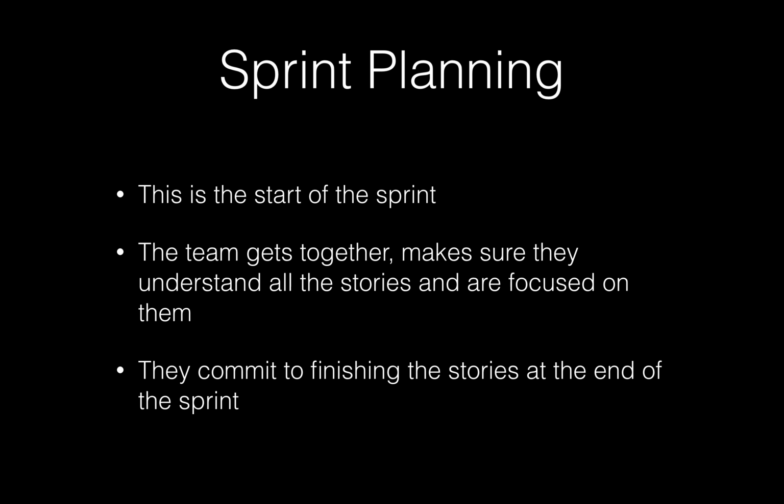Sprint planning is, as I said earlier, the first ceremony of the sprint. What the team does here is gather together and pick the stories they're going to focus on in the sprint. They commit to finishing those stories at the end of the sprint, so they make sure it's not too much work and not too little work. It's just enough work to get done in the sprint. And the entire team is talking only about those specific stories. They make sure they understand those stories very well. So the entire flow, the design, and the implementation, they try to understand as well as they can before they implement it.